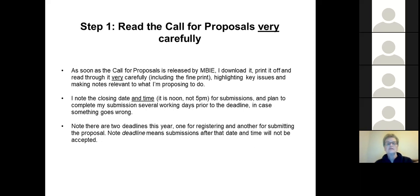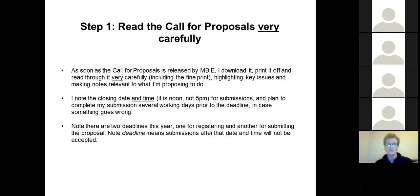The first thing I do is read the call for proposals very, very carefully, because there's a lot of detail that can affect what you can apply for, what you can't apply for, and how you might word your application. I download it, print it off because I can read paper much better than online, and I read through very carefully including the fine print. I highlight key issues, make notes about what I'm proposing versus what it says I can and can't do, and I note the closing date and time — the closing time is actually noon, not 5 p.m. as you'd expect.